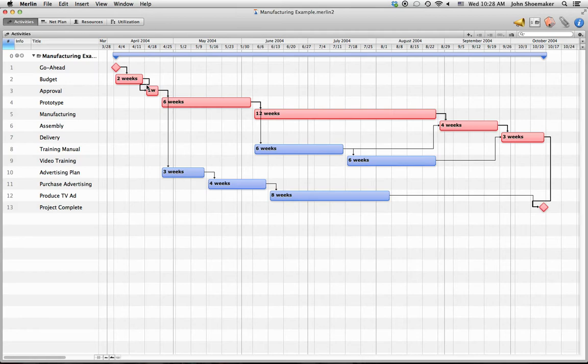And perhaps, well, in Baja California, it probably doesn't take very long, but up here in Washington, where it's not so hot, it might take 24 hours. So it's still finish to start, but we want to put a lag in there of, let's say, 24 hours. So as soon as the 24 hours are up, then we begin to paint the striping. Okay, that's a lag, and there are times when we want to put that in. Essentially, it's a buffer in between two activities.